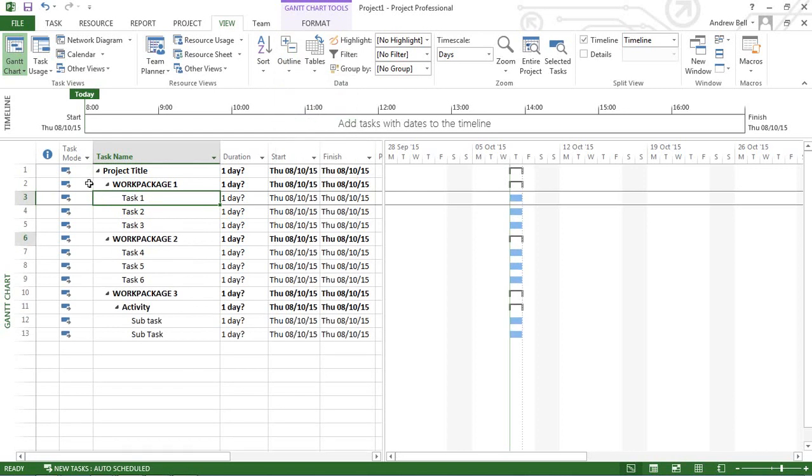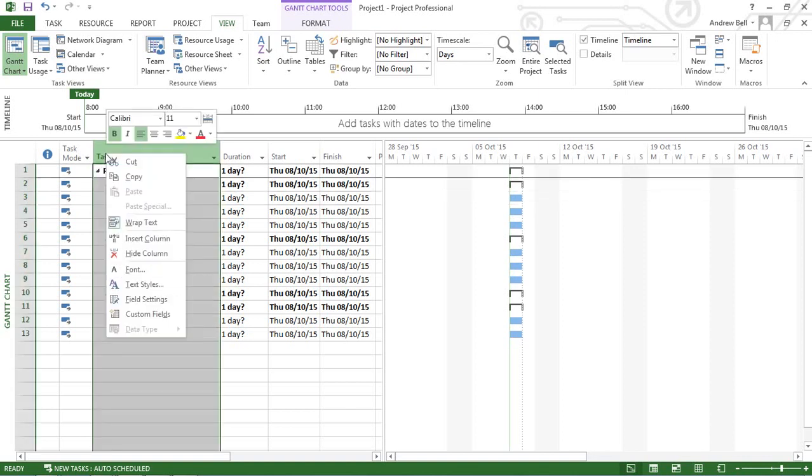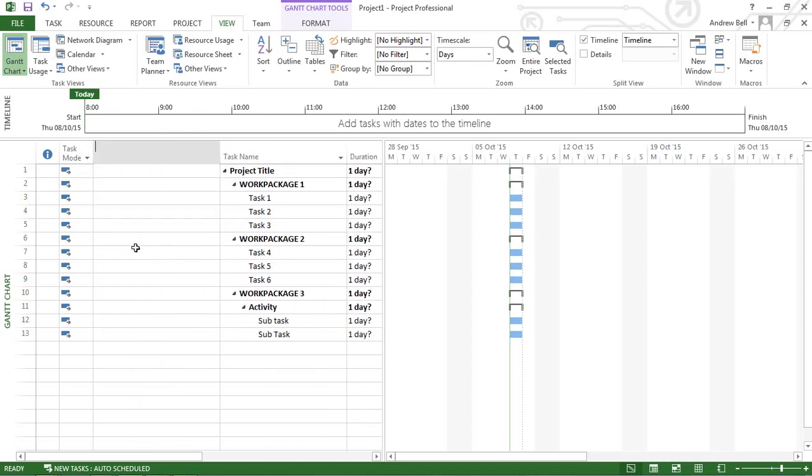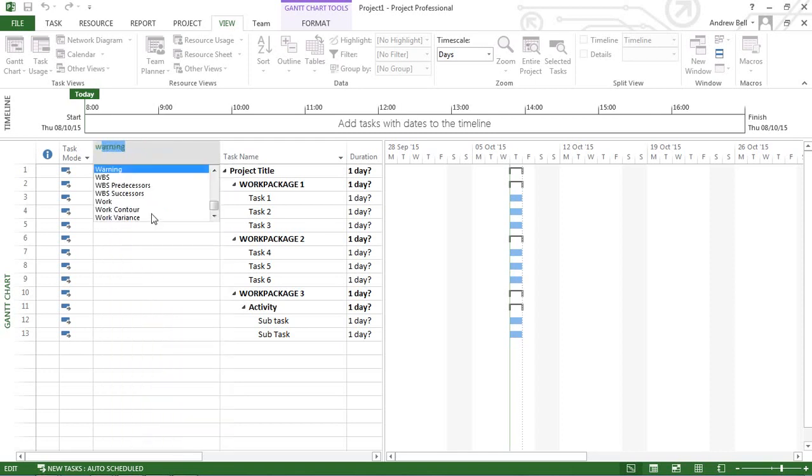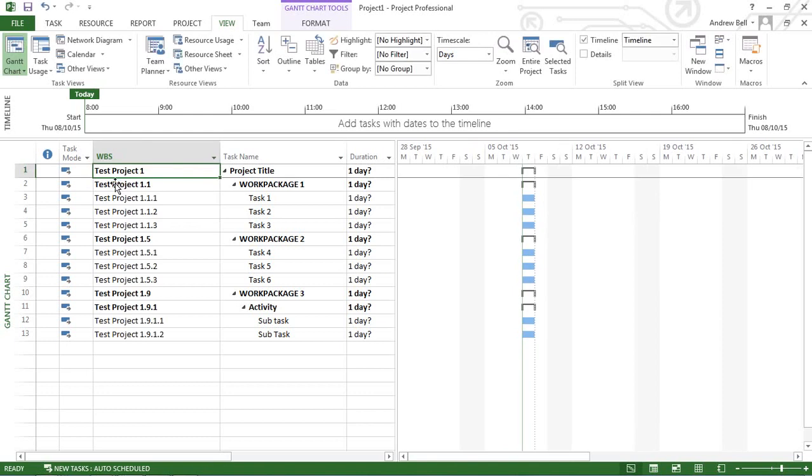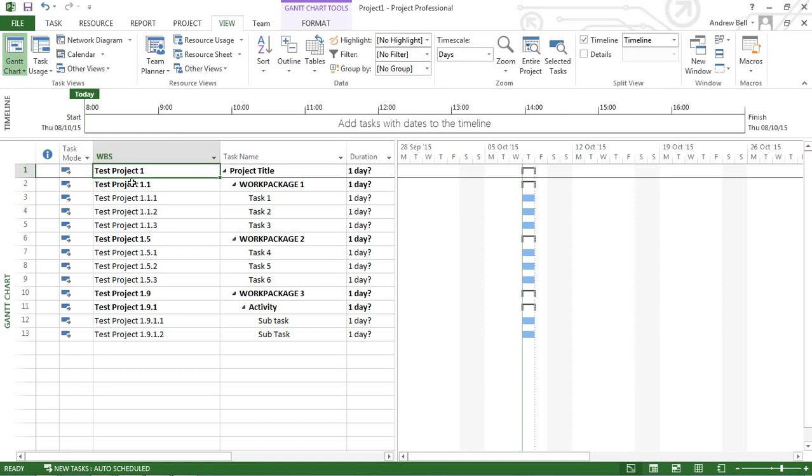Another feature is to insert the work breakdown code. I'm going to right-click in this heading area to insert a column, and the column I want is the WBS field. So I type W and it jumps to all those field names beginning with W. There's WBS. And there's my codes: one, one point one, one point one point one. That's my three levels. I've got four levels. And previously I had set up this to have a default prefix of test project.